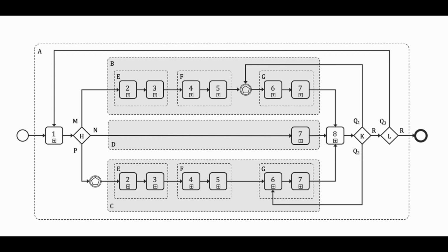Asset acquisition. Information is received from the previous owner and must be carefully integrated into the asset portfolio. The key activity is verification against the established information requirements. If the information is compliant, the process moves directly to information acceptance. These three paths are illustrated in the ISO 19650 Part 3 process diagram. What differentiates them is the position of the trigger event within the workflow.